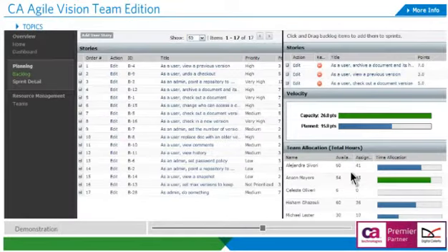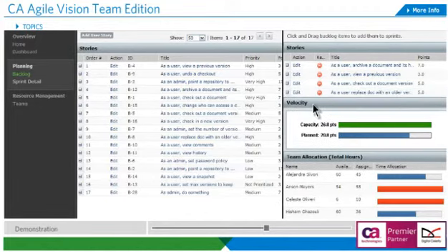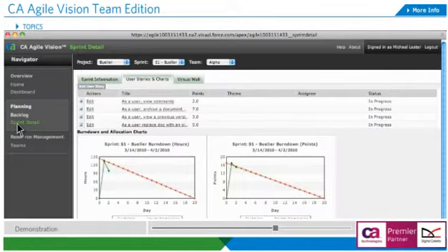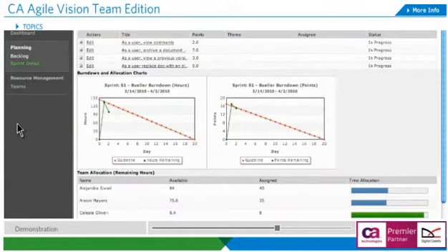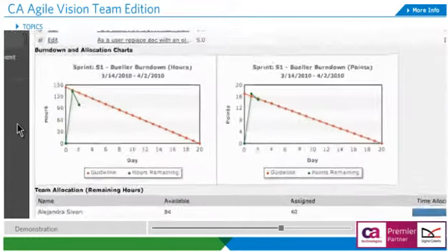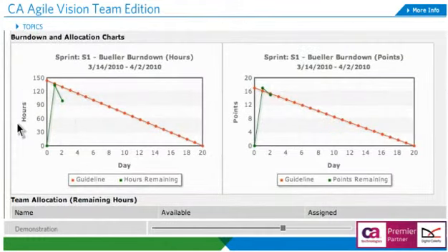In order to ensure the team is focused on the right priorities, you can also just drag and drop a user story to move stories in and out of the sprint as you plan. This makes it easy to adjust the scope of a particular sprint and keep the team on track. And by looking at the sprint details, we can manage the intricacies of a sprint. Beginning with the user stories and charts page, one can immediately see the burn down and velocity charts that give real-time updates to the progress of this sprint.